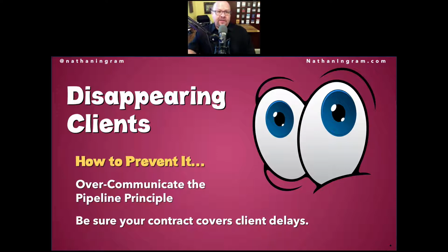If we're waiting more than 30 days on something, their project is suspended, which means that we don't do anything else on their project at all until 2 things happen. We have to have, number 1, payment for the project in full. Number 2, everything that we need to complete the website. So we don't move anything until we get those 2 things.